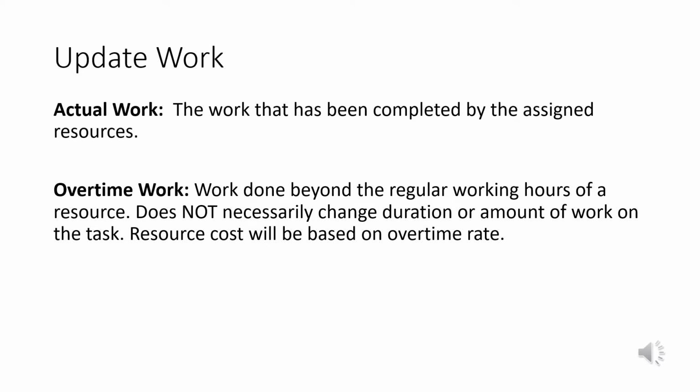Overtime work is work done beyond the regular working hours. It doesn't add to the duration or the amount of work, right? You just chose to do it on overtime. However, the resource cost will be based on the overtime rate that you set.